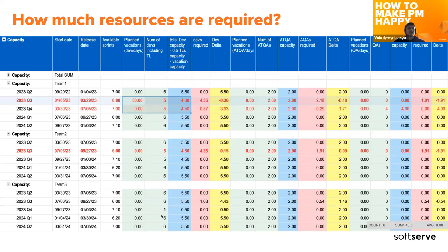We're usually using the OKR framework, so this could change. It could be quarters, years, months — whatever you want; everything is adjustable. In this screenshot you can see how the team's capacity is being calculated and how many devs are required to cover a particular scope. The most crucial column here is the delta — at some point you just check if your delta is not far away from zero.